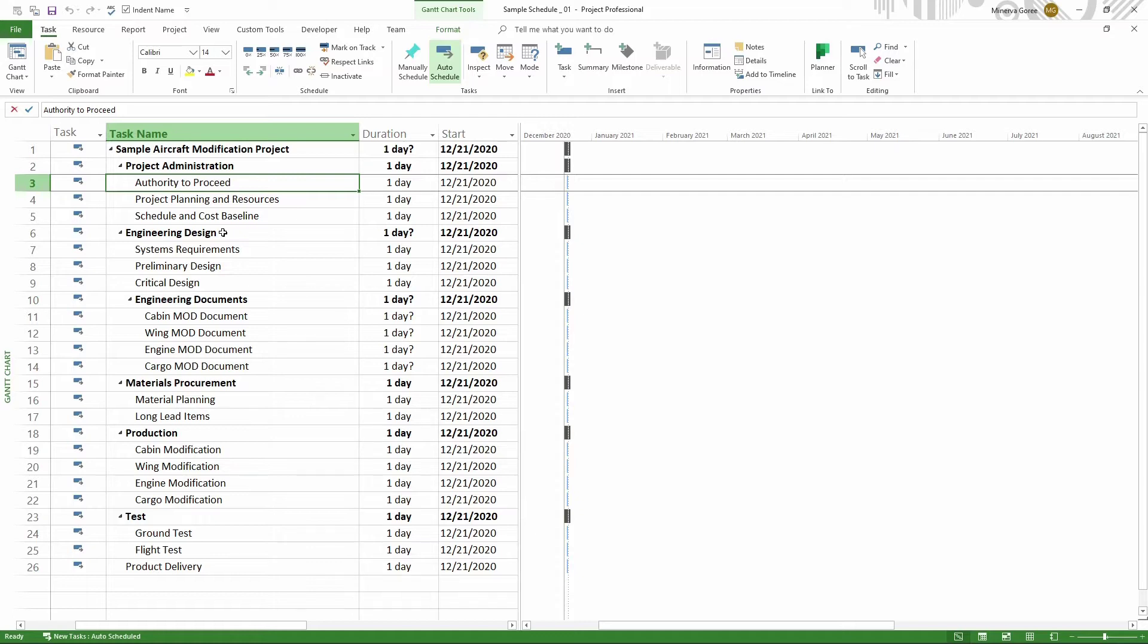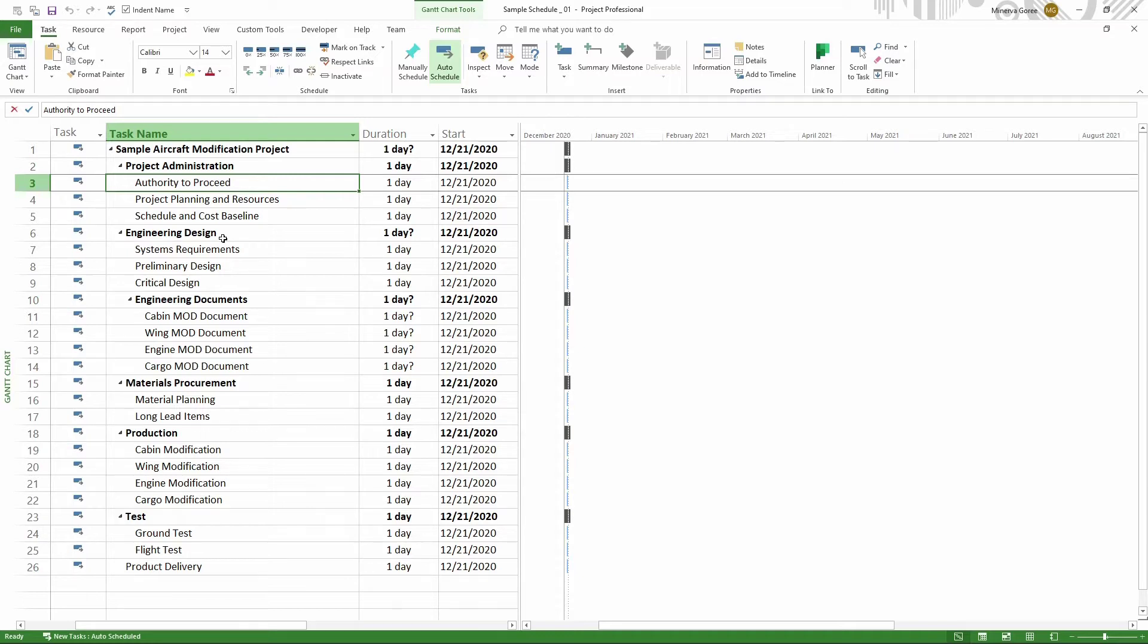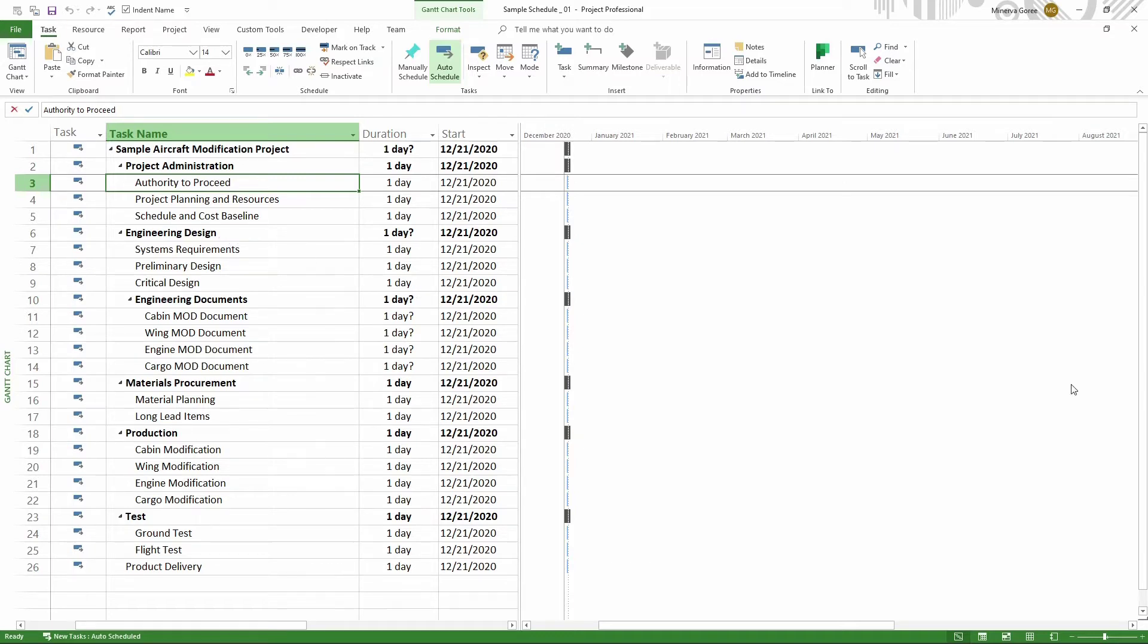First, let's define what a milestone is. A milestone is defined by the Project Management Institute, or PMI, as a planned completion of a significant event in a project. And according to Microsoft, a milestone typically has zero duration, although some milestones may need to have duration. Scheduling best practices is to consider a milestone with zero duration 99% of the time. So let's go define that in our schedule.